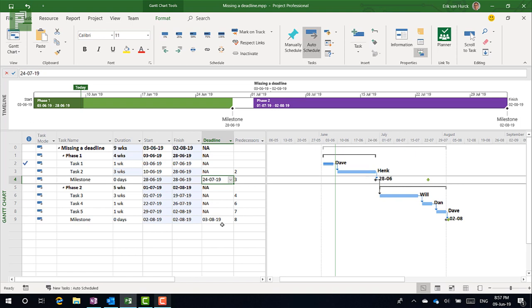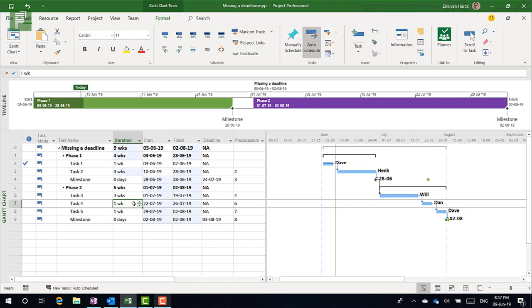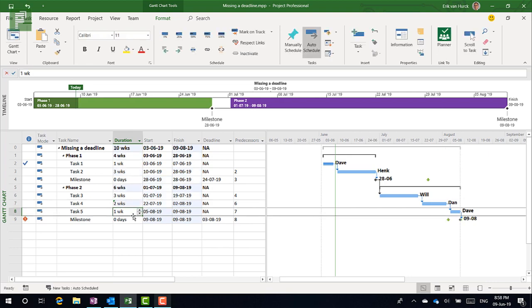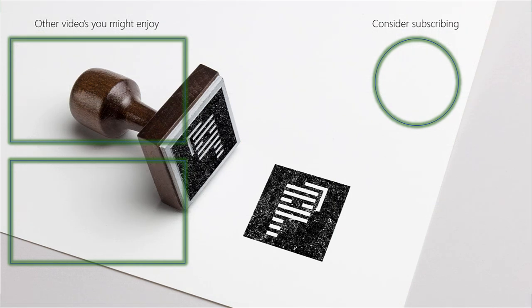So remember that this is something outside of your schedule that drives that schedule. For instance, the client said it needs to be there on the 3rd of August. Now you're going to schedule that as best as you can do. But are you going to make that deadline looking at the current schedule? Currently we are making it, but let's say for instance Dan is slow - well if Dan is slow, we'll have an issue.